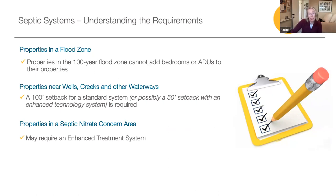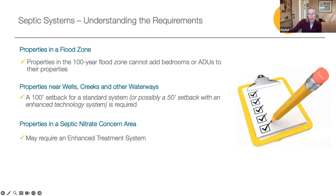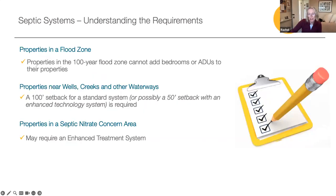Some other considerations: properties in the 100-year flood zone cannot add bedrooms or ADUs. Properties near wells, creeks, and other waterways require a 100-foot setback, but enhanced technology systems can be used to reduce that setback, possibly in half. And properties in the septic nitrate concern area may require an enhanced treatment system. These are all site conditions you can research using the GIS interactive mapping system — we really encourage you to get in there and start exploring.